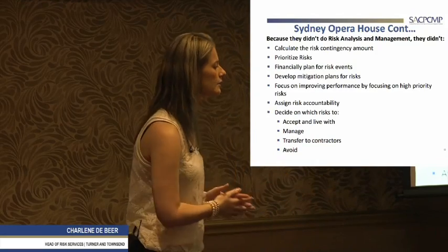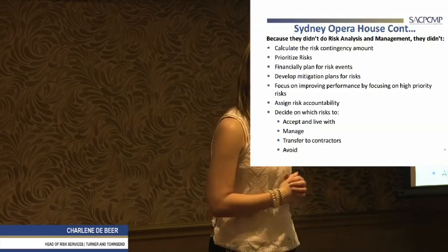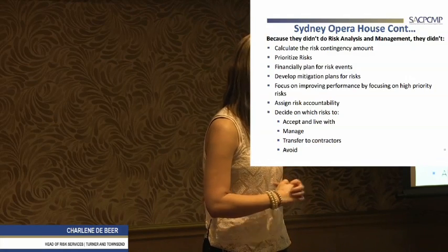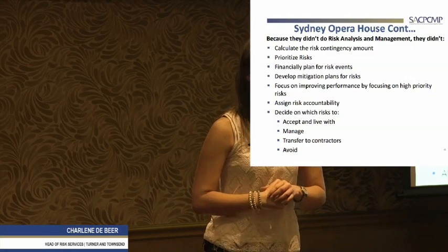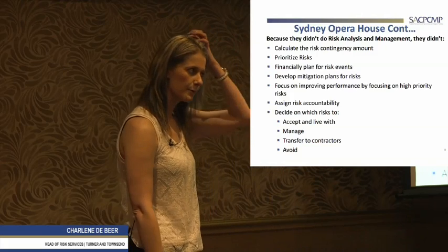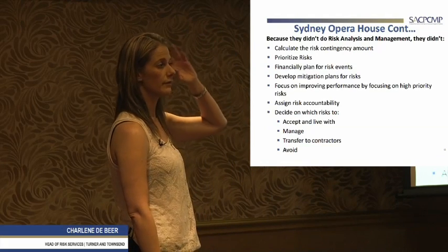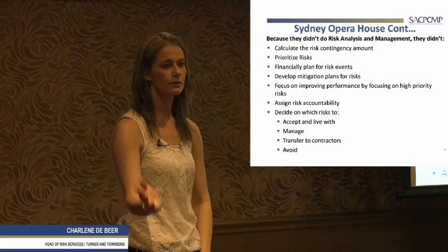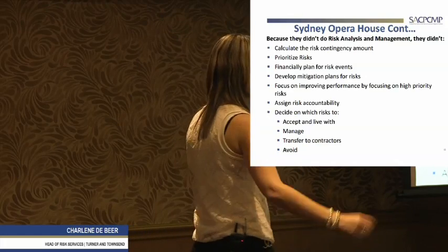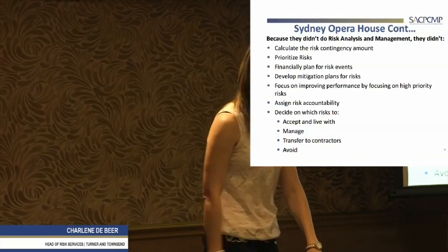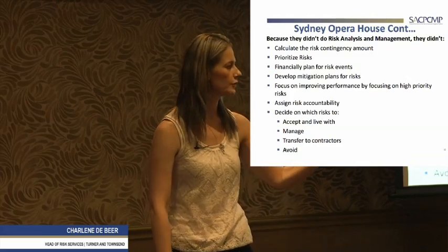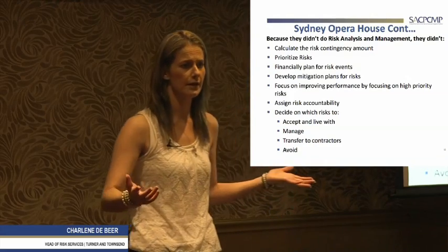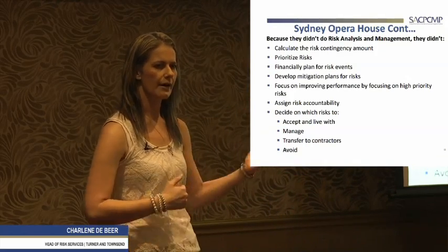They'll probably say yes. They'll say, yeah, it will cost you, let's say, 10 million rand if you want to buy it out. And then we might say, well, we don't really have shipping time to put it on the sea. So what we want to do is air freight the valves in. So it might change a 10-week lead time of transport to 2 weeks if we fly them in. But of course, that also comes at quite a higher cost.